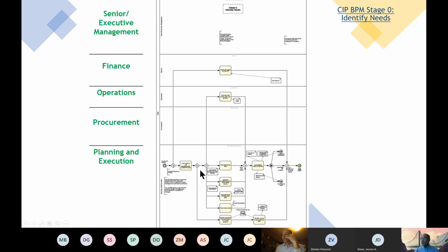And then as part of this process also, we will update schedules, cost, and scope of already approved projects. Because of a number of reasons, projects which are already approved also will have to be reevaluated and revised, because they need additional scope, additional schedule, or additional budget request. It has to be also considered during this process.